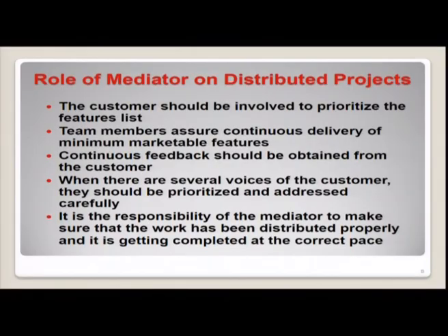So, the customer should be involved to prioritize the feature list, and the team members should assure continuous delivery of minimum marketable features. As far as we are speaking about the role of mediator with respect to distributed projects, in a distributed project, continuous feedback should be obtained from the customer or his customer representatives. And when there are several voices of the customer, they should be prioritized and addressed carefully.